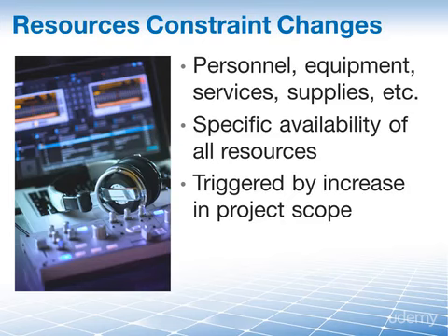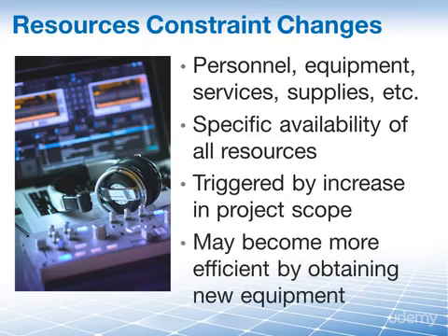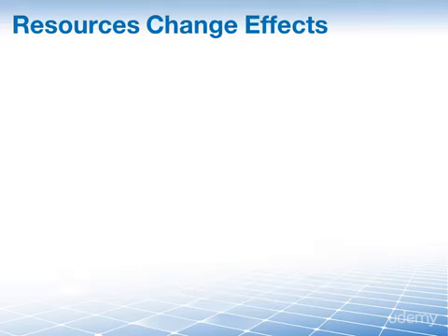In addition, your project's schedule may even be shortened if you obtain a piece of equipment that tests software code faster or hire a consultant who can be more productive in a shorter period of time. In other words, an increase or decrease in resources can affect many other project constraints, including the schedule, the budget,